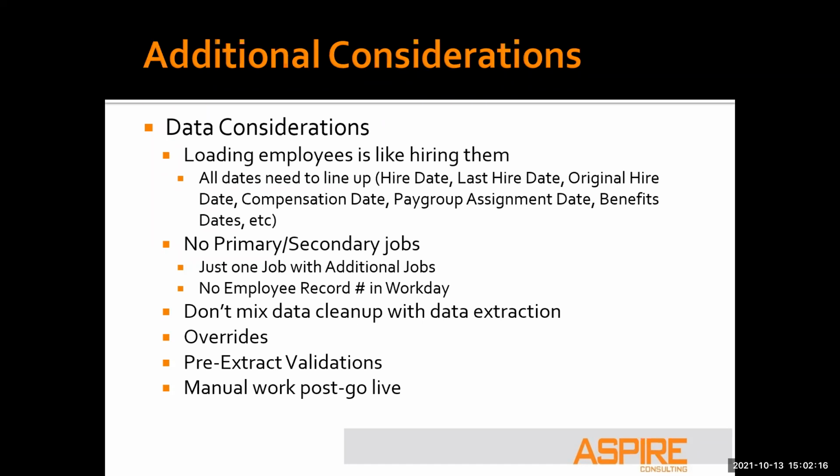Also, I encourage you not to mix in your data cleanup. Conversion is not an attempt to clean up data. So if you know you have data issues, deal with those separately. Do not build them into your scripts. Don't be changing people's compensation in your script so that you can get it to load into Workday. You quickly lose track of what happened to that data in between PeopleSoft and Workday, and connecting the dots will forever be a nightmare. So just something to keep in mind there.